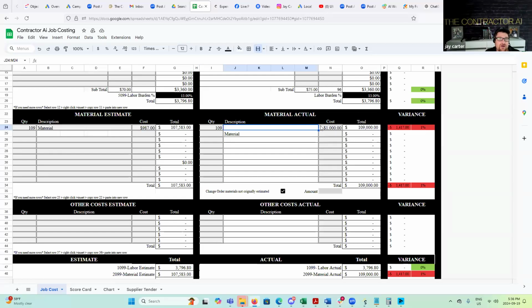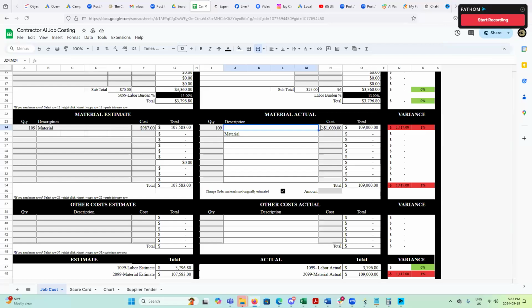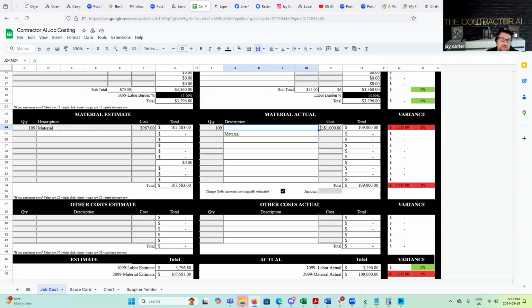You remember that overhead recovery discussion we just had? What do you think happens when a supplier can't collect from their accounts? Do you think they absorb that loss? No. No. No. They pass the costs on to everybody, if you let them. And I promise you, if you were ever to track what you got locked in confirmed price for versus what you actually paid, you're going to find a 1 to 2% variance every single time. Electricians, plumbers. And the reason is it's a very well-known thing that suppliers have to make their money back. They can't lose either.